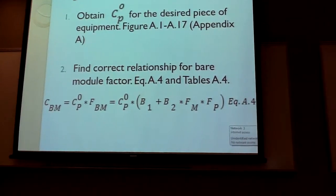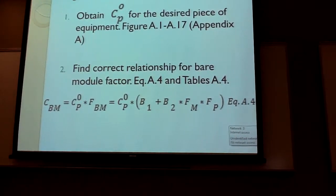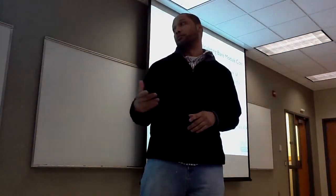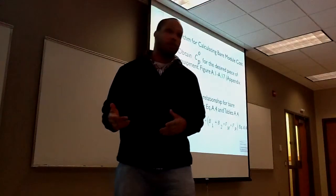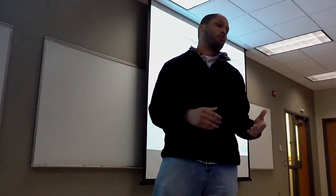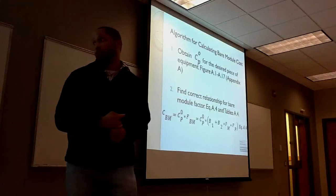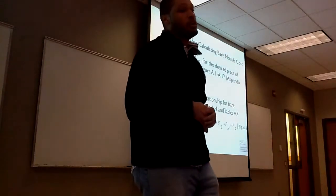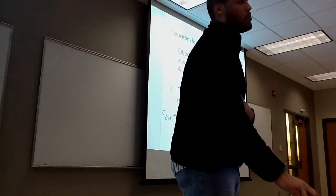The second step would be to find the correct bare module factor. This would be done by using equation 8.4, where your C sub BM is your bare module cost. You would multiply your cost of equipment by the bare module factor F sub BM. Since you wouldn't know your F sub BM directly, you would multiply your C sub P0 by B1 plus B2 — which are normal constants — multiplied by your material factor times your pressure factor. You would use table 8.4 to help with this.